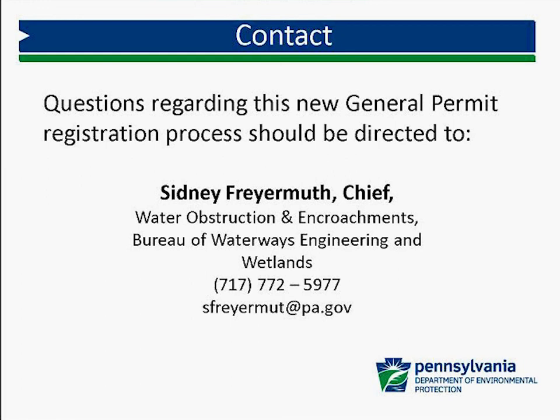In reference to the last question, should you always submit the other GPs with the GP11 to DEP, or can I still submit through the Conservation District? If you're registering a GP that has to go to the department, it's highly recommended that you submit other GP authorizations as part of that project to DEP.